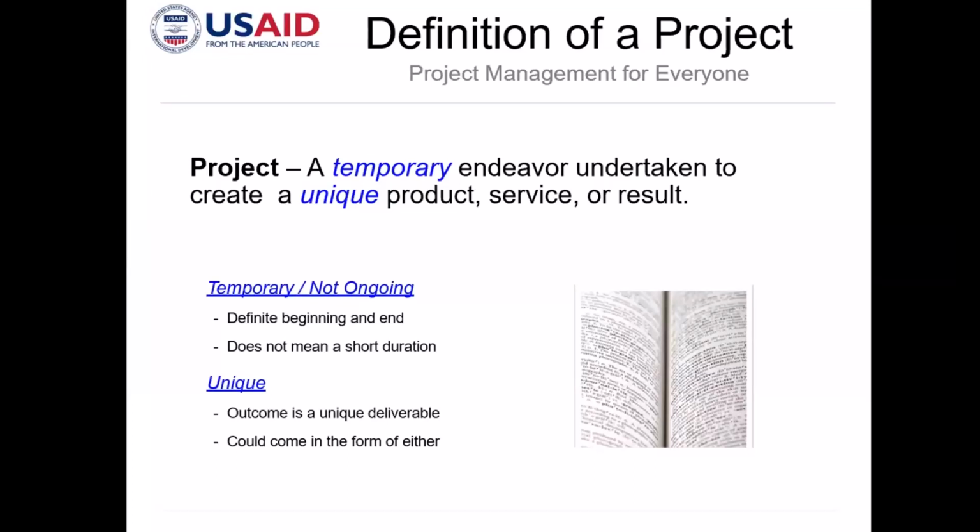There will be many projects under that program, and those related projects will have to be completed in parallel or maybe one after another, but the ultimate goal is the objective of the program, and that is to deploy an optimized and efficient ORAN environment.